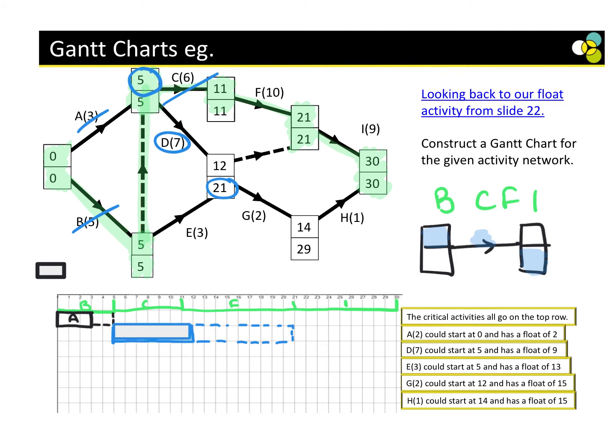Now, you can cut up a tiny piece of paper to slide it. We will need to start sliding them during the lesson. Okay. So D, and let's just make sure. For D, this is saying that essentially, can you see that we could actually start it at 14 minutes and still be finished in time for 21? Yeah, because does anyone know what D stands for?